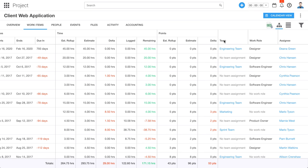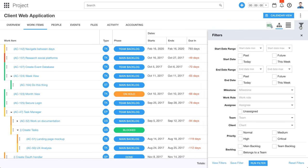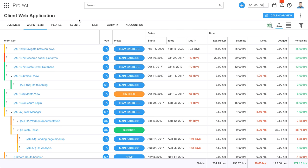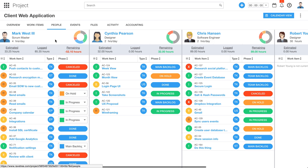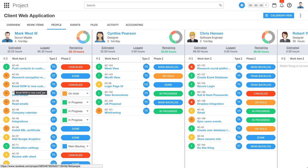We'll show you some other information about each item: the team in which it's associated if any, the work role that you assign that item to, and then any assignee that you may have. This can also be filtered. The people tab is going to show me all project members. Here I've got a nice column view for each of the project members. I can see all the individual work items that they're working on or have worked on for this project, the total number of estimated hours, how much time has been logged, and then how much time is remaining. So we can see that Mark has gone way over on his original time estimate, whereas Cynthia hasn't yet gotten started with any time logs.